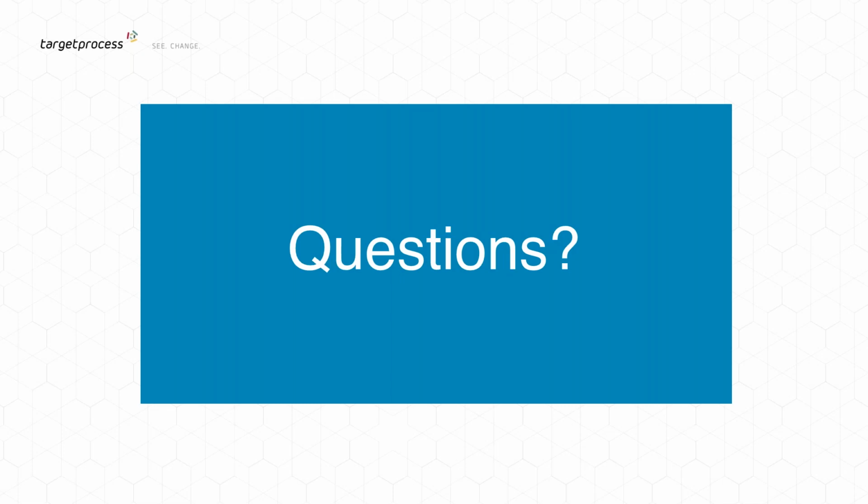Awesome. I think, Greg, we should start with this question. What is a reasonable implementation time for a 100-person installation? Yeah. I think just implementation, I'm saying 6 to 8 weeks is very reasonable. You could probably even do it in 4 weeks for a 100-person organization, but 6 to 8 is plenty of time to get your team set up, your relationship set up, get training in place, and to get that rolled out. That's a fairly simple process. The evaluation before that might take another 4 to 6 weeks, but the actual implementation should go quickly.